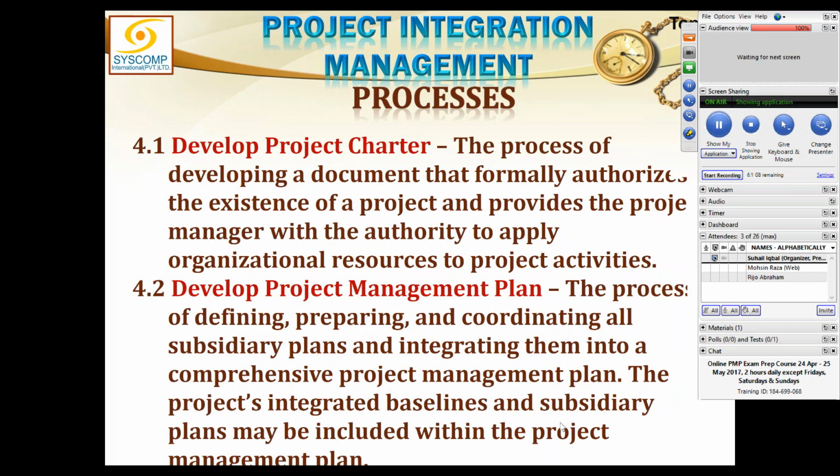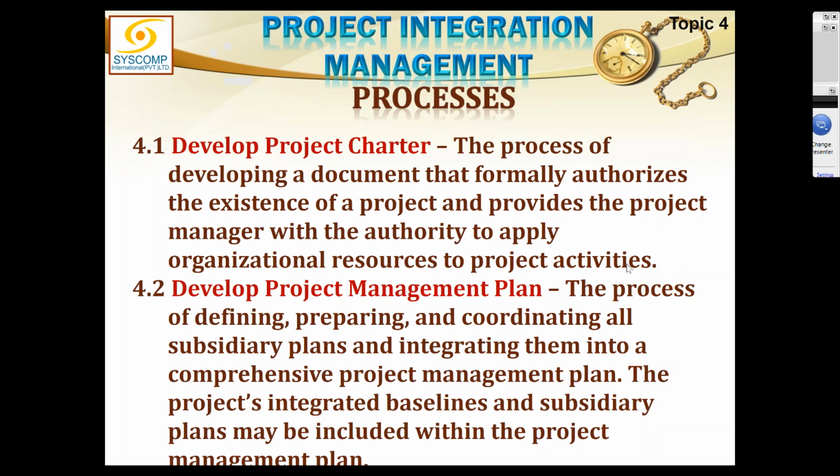Okay, let's define each of these processes in very brief words. Project charter. Develop project charter is our first process, and I will keep asking questions in the way, so please bear with me. Develop project charter is the process of developing a document that formally authorizes the existence of a project. So this is the formal authorization given to the project manager to mobilize the resources. So what does it say? Formally authorizes the existence of a project and provides the project manager with the authority to apply organizational resources to project activities. There are two main things happening here.